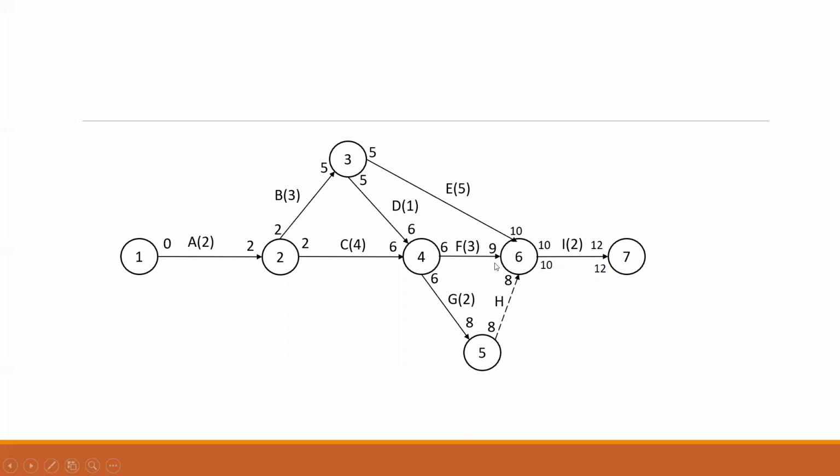In this case, if I have 10 here, 10 minus 3 will give me 7. So this will be 7 down here. And on top, we have 6, 6 and 7 here, and here we're going to have 5. Now here we have 10 minus 3, that is 7, whereas in this case, 10 minus 2 gives me 8 here.